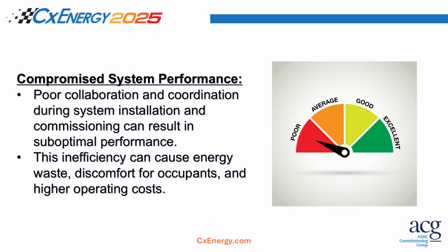And then compromising system performance goes on throughout the process. On projects, especially with the hydronic piping, I try to walk the project earlier. I reach out to the controls contractor and say, hey, while we're here, let's walk the piping. Let's spot your wells, because they're 75% done with the piping. Let's do that now so we can get the 2/3 sensors of the water inside the building.